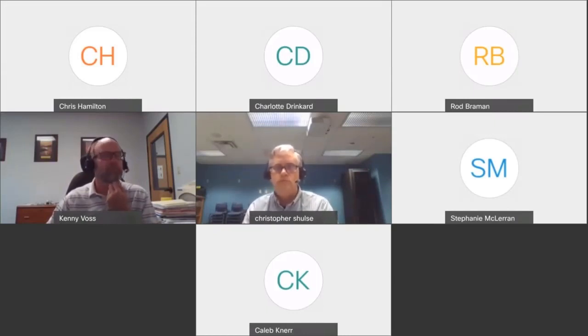There was a question at the beginning of the presentation about the 404 permit, the waters of the United States, in regard to fill placed in the water assuming the ordinary high water mark as the start of that boundary, correct? And I just wanted to say, yes, that is correct. We're wanting to know what the fill is below ordinary high water because that's what is under jurisdiction of the Corps. Anything above that, though, would be considered upland and not subject to permitting.